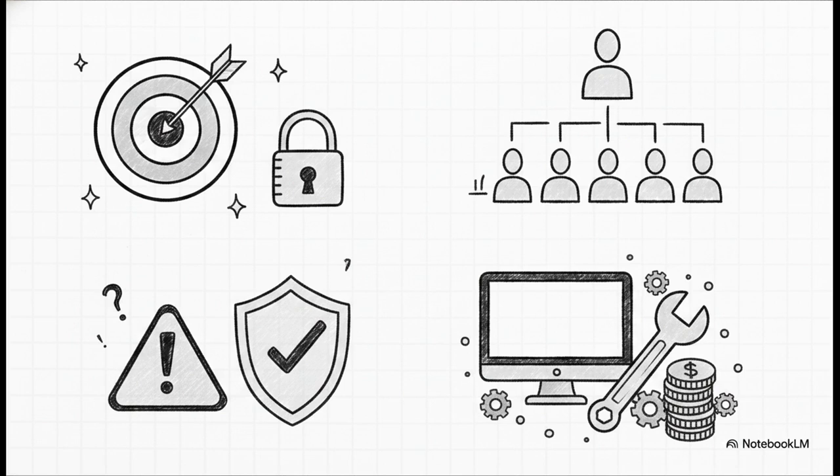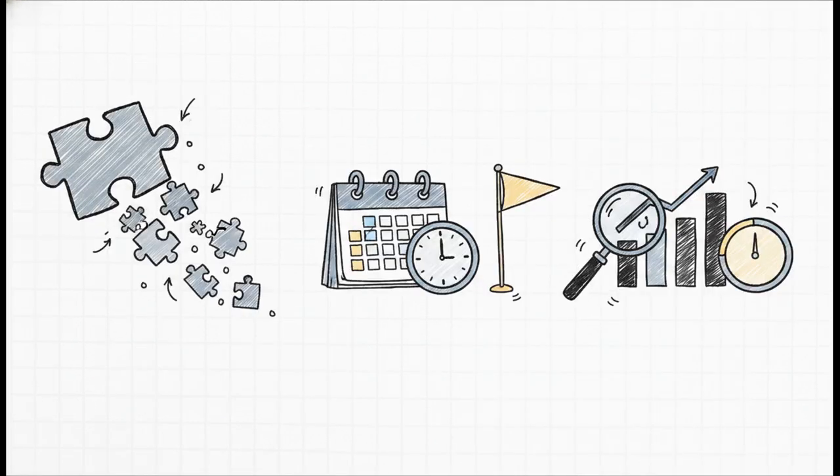Fourth, we have hardware and software resource requirements. This specifies the exact tools, the support software, and the hardware needed, and it even includes price estimates and delivery schedules if we need to purchase things. And this perfectly leads us to the final 3 sections, which map out exactly how the daily work is executed and tracked. Section 5 is the work breakdown. This is where you slice the overall project down into specific activities and identify the inputs and outputs for every single one.